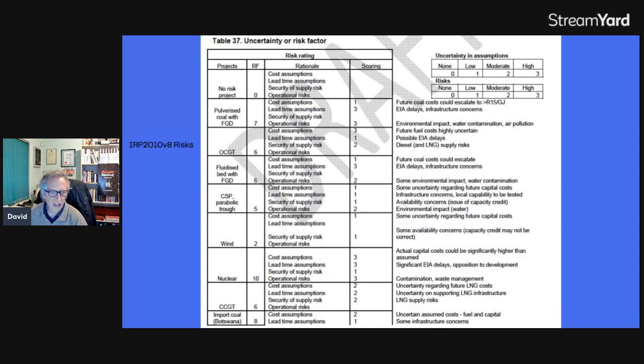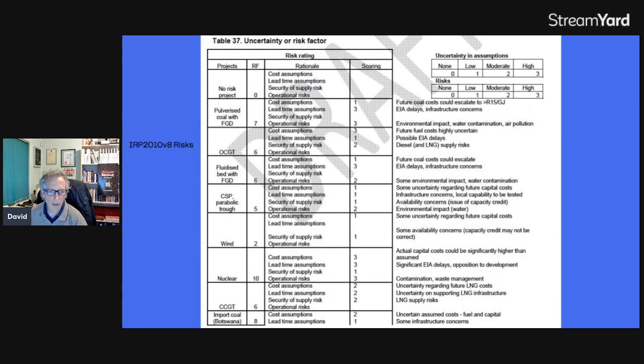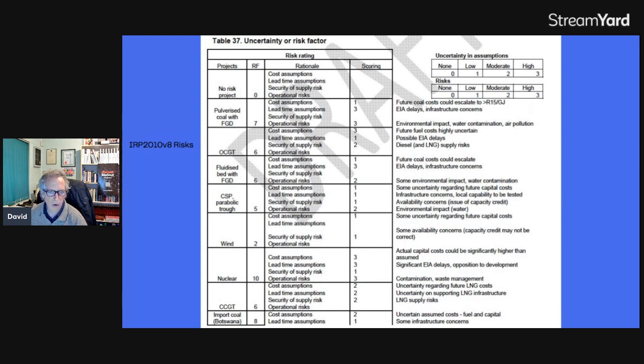Then the next highest is pulverized coal. And that's got a seven. So cost assumptions, one. We think we know what it's going to cost. Lead time, we have no idea how long it's going to take. Security of supply, well, South Africa's got 1,000 years of coal. And then operational risk, three. So that gives us seven.